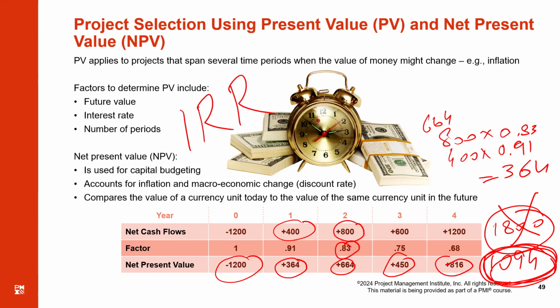So what I mean to say is, I am not going to use the discount rate from the bank, but I will put that as an X value. The discount rate, I'll put it as an X value. Now, you may have to do a lot of hit and trial. You try it with 2%, 3%, 4%, 5%. You have to do all these calculations.